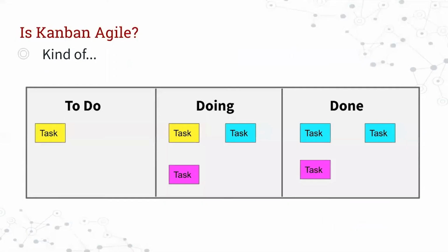So really, this is what the Kanban board looks like, right? This is a very high level, very basic one. You'd have more swim lanes in here, not just to do, doing, and done. You'd have things like to do, in development, in QA, in implementation, done, or something like that, where it's a little more complex, especially with software. So that's why I say Kanban in itself is not necessarily Agile. It is a concept that is used in Agile, but not necessarily in itself a 100% Agile